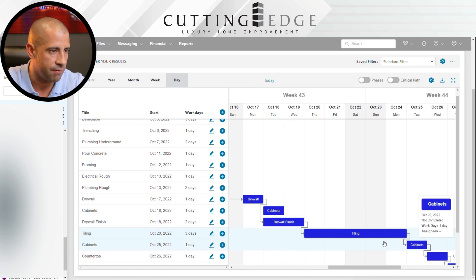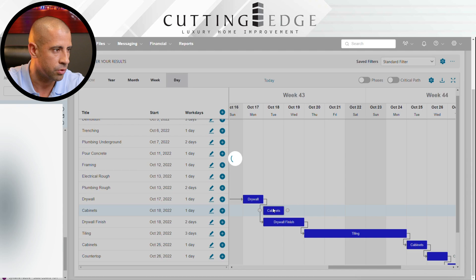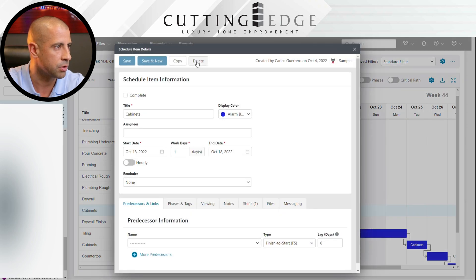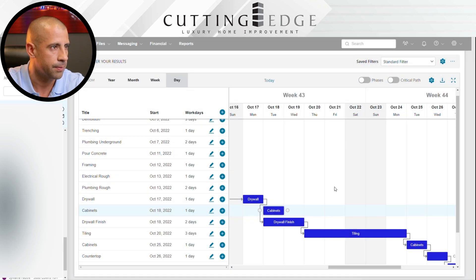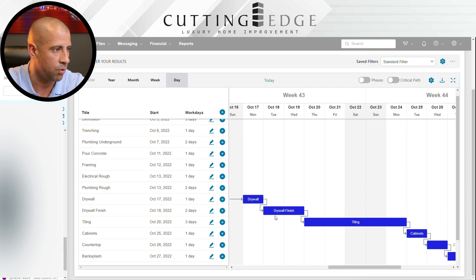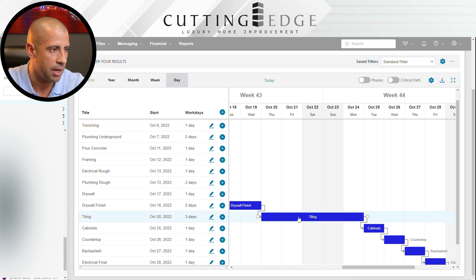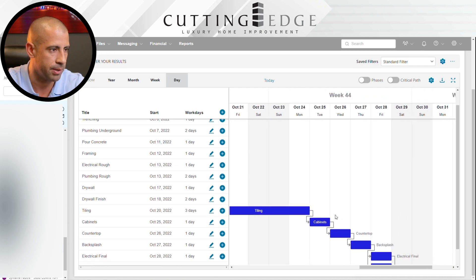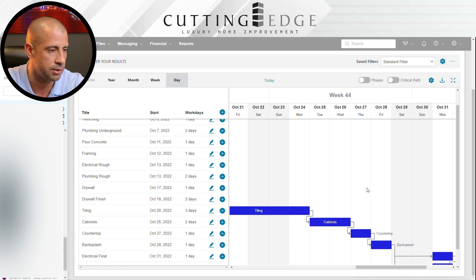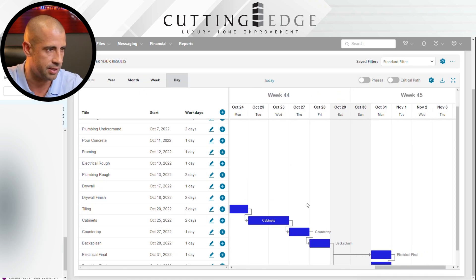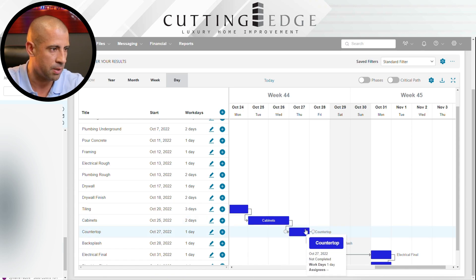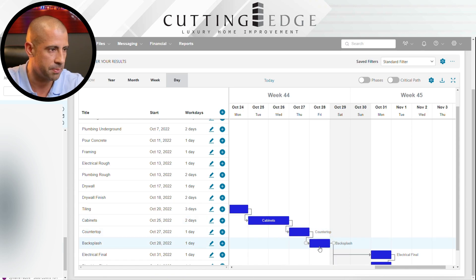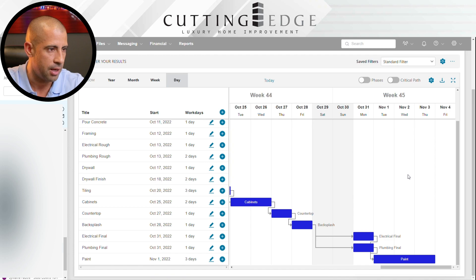I have a duplicate cabinet activity, so I'm going to go ahead and delete the wrong one. After drywall, I'll do drywall finish. After drywall finish, I can start tile work. After tile work, I can start cabinets — probably two days for that activity. After cabinets, we start countertops. After countertops, we do the backsplash. Then electrical final, plumbing final, and then paint.